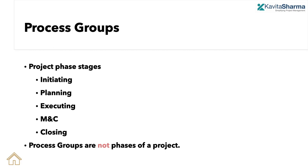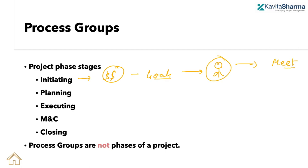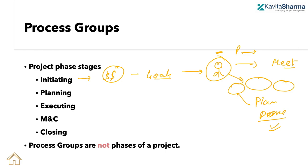Let's understand process groups first. We initiate a project — somebody who has money says, 'I want to attain these goals, let me have a PM, a leader, who can arrange to get these goals met.' So the PM is assigned to the project, identifies the people he should be speaking with, creates a plan, gets things done, and then gets a sign-off. This is typically the flow.